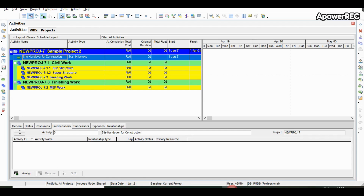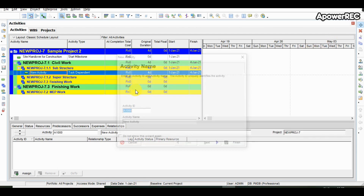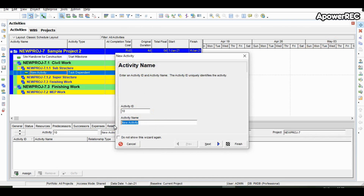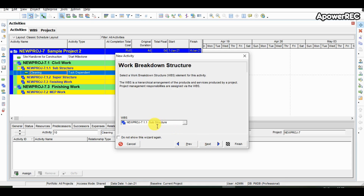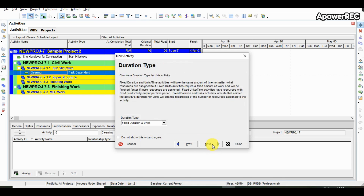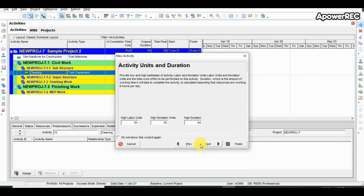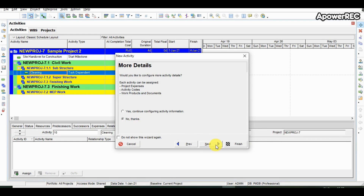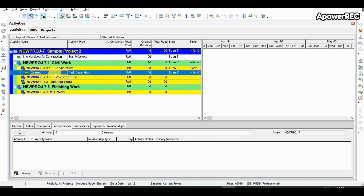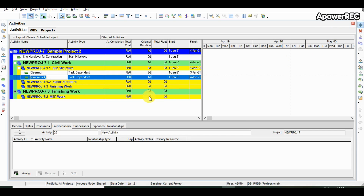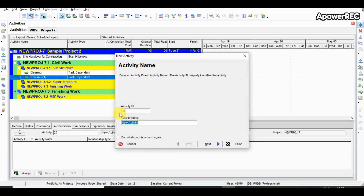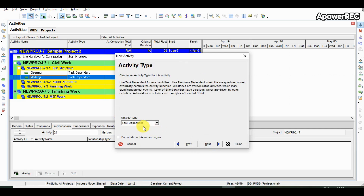The next activity is cleaning. We will select the relevant WBS — substructure — and take the code as 10 with activity name as cleaning. The WBS has already been selected. By default Primavera will take task dependent as the activity type. All other information will be fed later. We only need to add three details: activity ID, its name, and the activity type. After cleaning, one more activity under substructure will be marking. The duration is put directly on the screen and the ID automatically increments by 10, so 10 plus 10 is 20. We have defined the activity as marking.